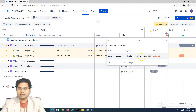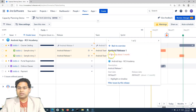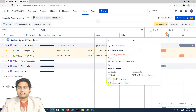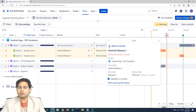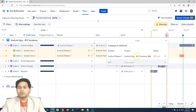Let's switch to the months view — you'll see there are two releases shown in red. If I click on that, you will see the Android release is off track. Clicking on details will show that it is off track by about a month. This gives you a clear indication when releases are off track, why they are off track, and by how much time. You can keep an eye on how issues are progressing and remove blockers to make sure releases occur on time.